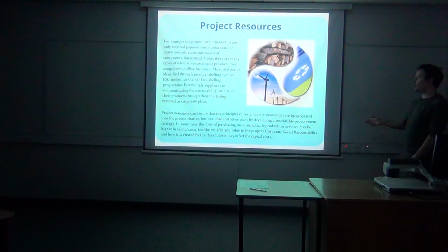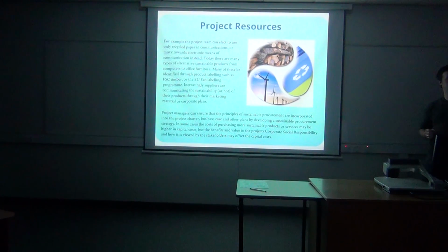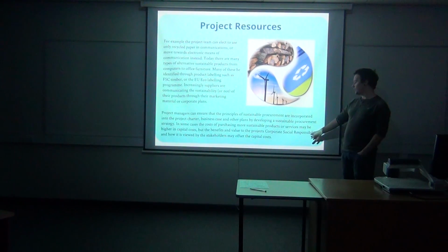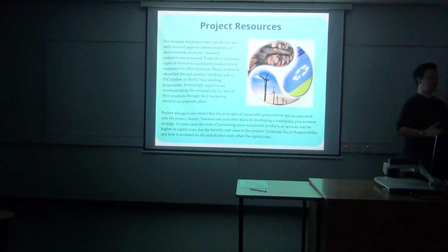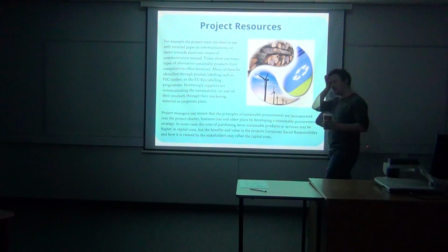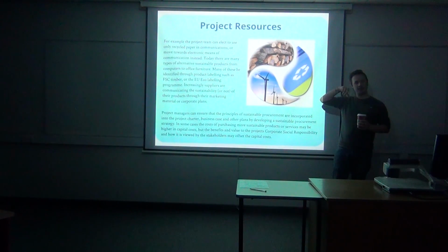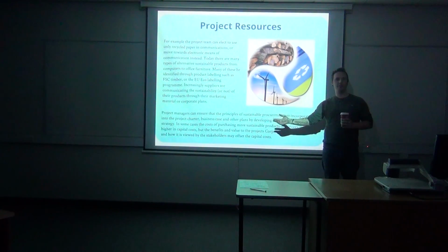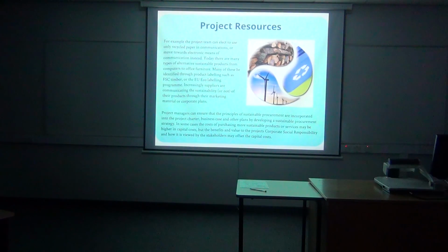In some cases, the cost of purchasing these products may be a little bit more, so we need to plan for that in our breakdown structure and in our budget planning. But sometimes we can try to offset that by the benefits we might get from our corporate social responsibility and from our external facing communications. So we might say, okay, it's going to cost us a bit more to use these resources that are more sustainable. But as Ray Anderson said in that video a few weeks back, being sustainable is the best marketing tool we've got, so we can reduce our marketing budget accordingly. But we can only do that if we think about it at the planning stage.